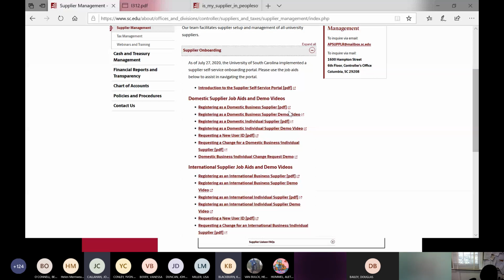Thank you. If someone does not want to complete the online process but has performed work for us, I have been asked if I could complete it for them. So I think the question is if a supplier has already completed the work but hasn't registered as a supplier. Before any work is performed or a product is purchased, a supplier should already be in the system.